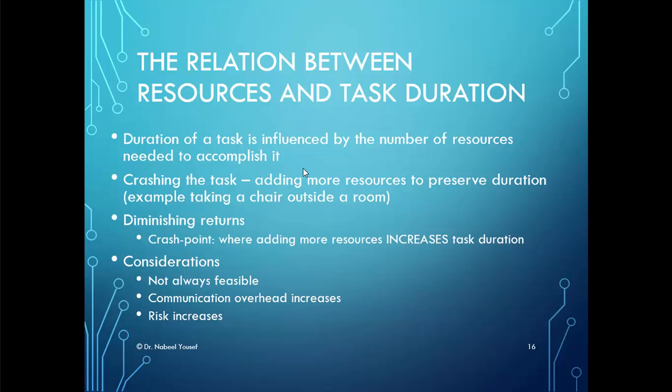The duration of a task depends on the number of resources available. For example, two people might move a sofa faster than one person, and three could also assist, but at a certain point increasing the number of people will actually increase task duration. This point is called the crashing point — instead of assisting each other, four or five people might create a discussion or argument about how to move the sofa, extending the time or causing it to be done incorrectly.